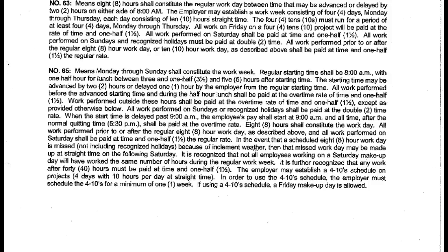It gives you all the requirements, and it tells you what happens during inclement weather, how you make up that time, all the rules of how you establish a work week. It says down at the bottom, if you look here in this last sentence, the employer may establish a 4-10 schedule, 4 days, 10-hour days at straight time, which is your regular rate.